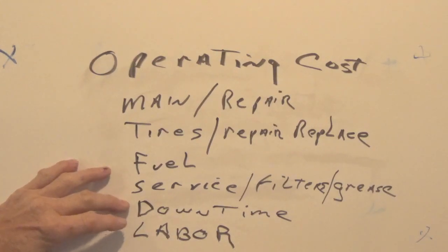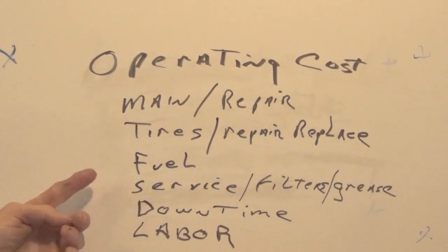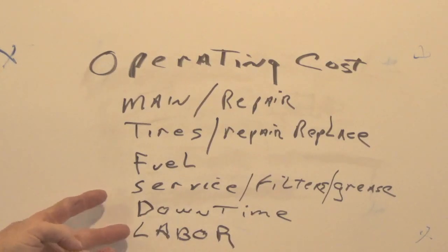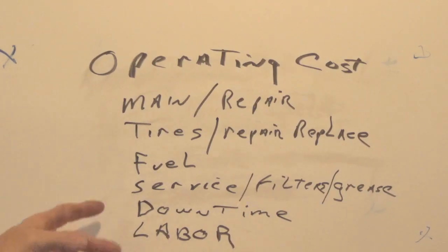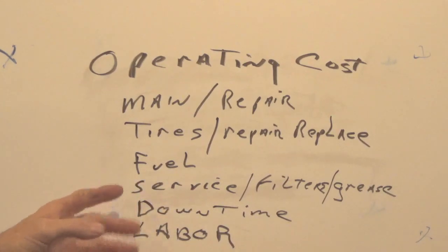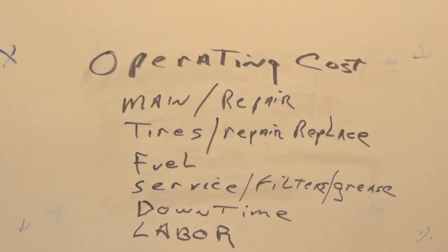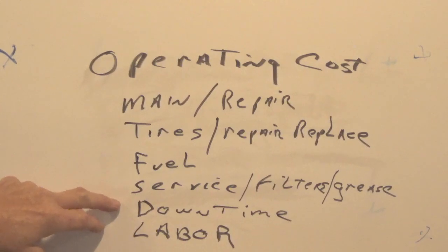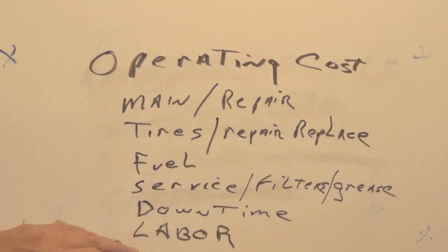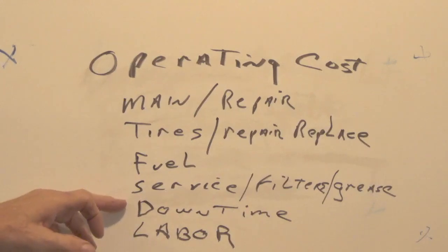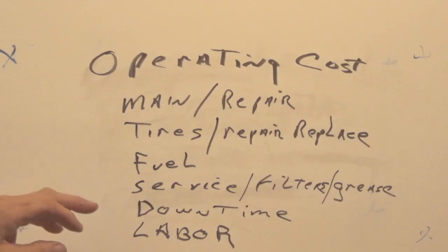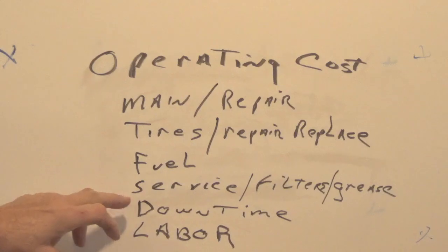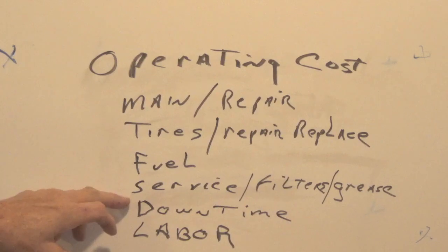a small contractor, and let's say you have a dump truck, a trailer, and a backhoe, and you're going to use that dump truck to haul the backhoe over to a project. Now most homeowners or whoever you're working for is going to say, well, wait a minute, you only use the truck for an hour to bring the backhoe from point A to point B. In reality, it doesn't matter. That tractor and trailer, or truck and trailer, have got to be charged for the whole day.